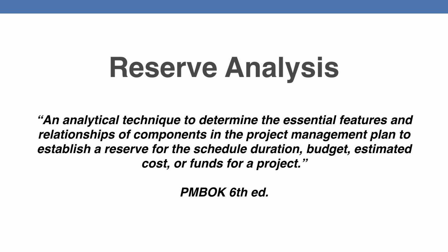The reserve analysis is an analytical technique to determine the essential features and relationships of components in the project management plan to establish a reserve for the scheduled duration, budget, estimated cost, or funds of a project. So in other words, the reserve analysis looks at how much time and how much budget you have remaining, and whether the reserve is enough to cover you for the remainder of the project.